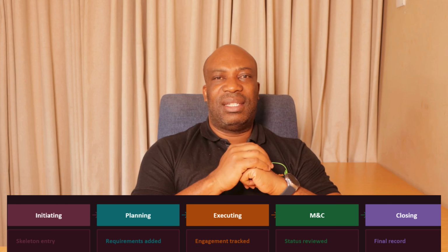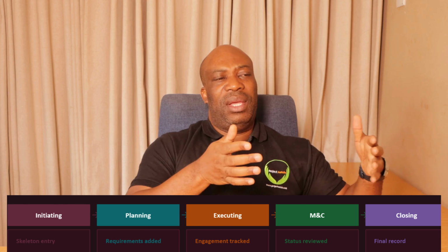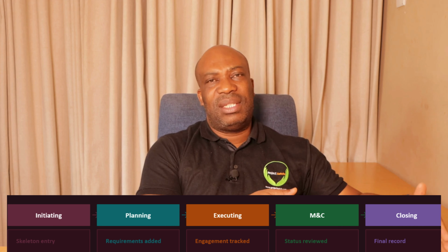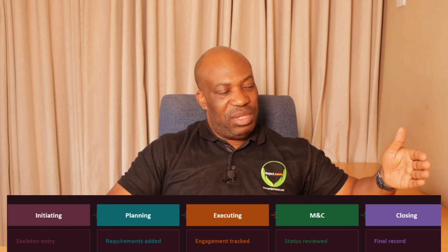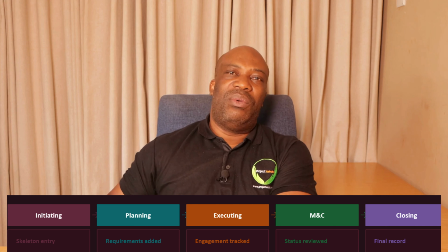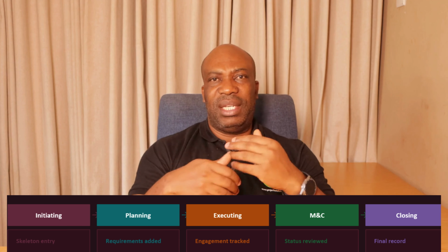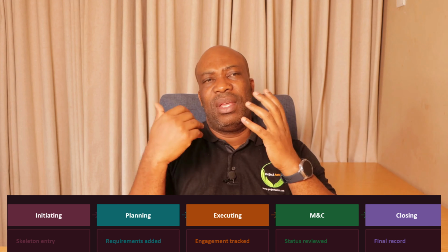Then they leave it like that. That's not the correct way of doing it. Stakeholder register must be updated throughout the project, from the beginning all the way up to the end. So that is one characteristic you should expect. It is a living document, always updated throughout the project.